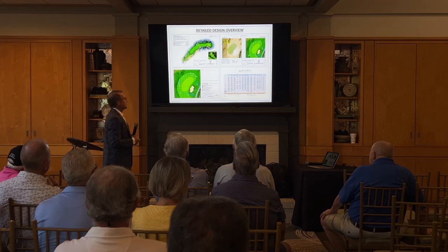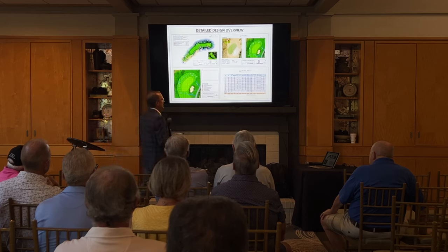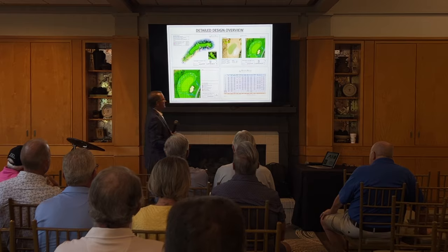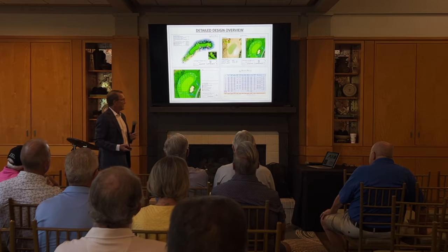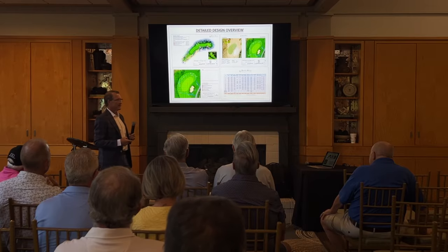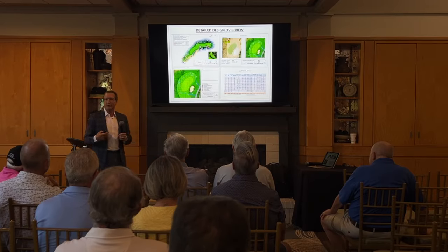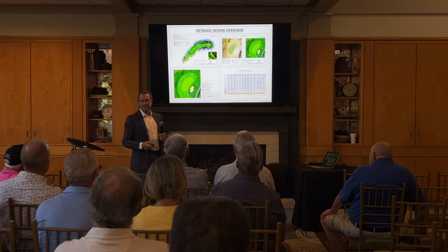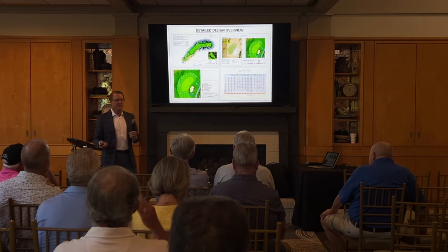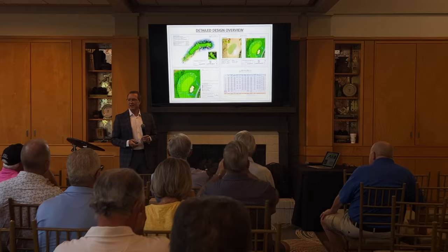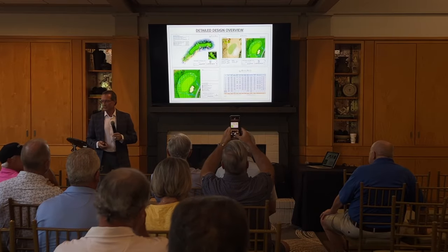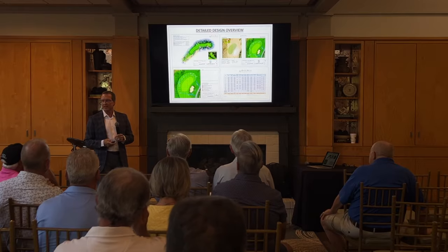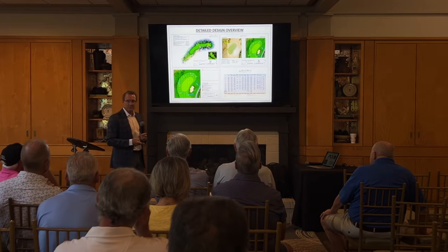Once again, just some graphic details. This spreadsheet here is basically what you have today and the proposed numbers and the increase in green square footages, bunkers, tees, sod allowances, drainage, etc. So that's an all-encompassing spreadsheet that really helps drive the calculation of the BOQ, which is built quantities, which is kind of the document that we use when pricing projects.